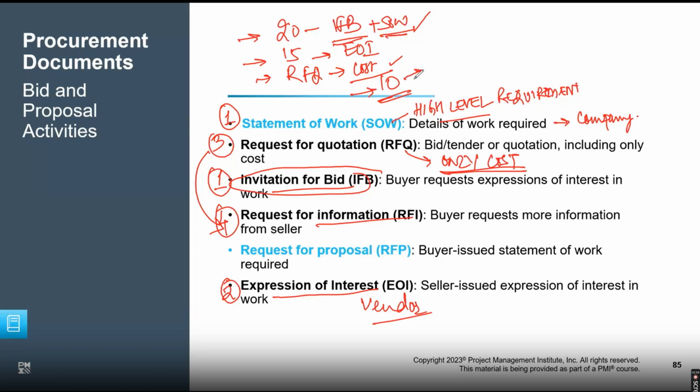Now the company sends to those 10 people that, okay, we have received your quotation and we want you to share additional details. What are these additional details? I want to know more about this vendor. Have they done a similar job in the past? What is the company's net worth? Any references they have done, and are they ready to share the references and contact details? And do they have debt outstanding or not?